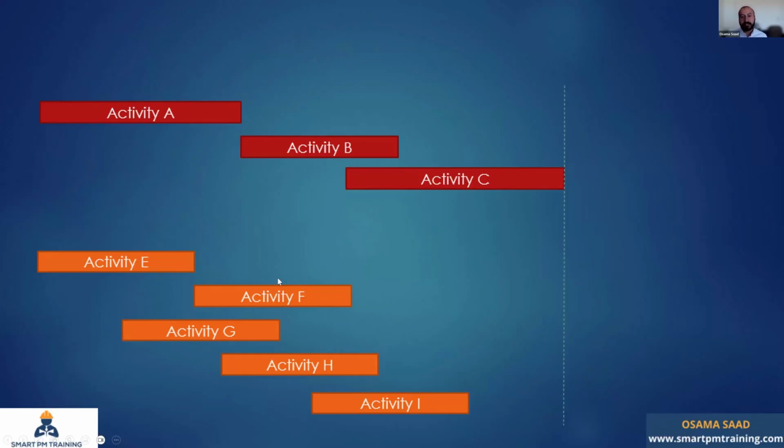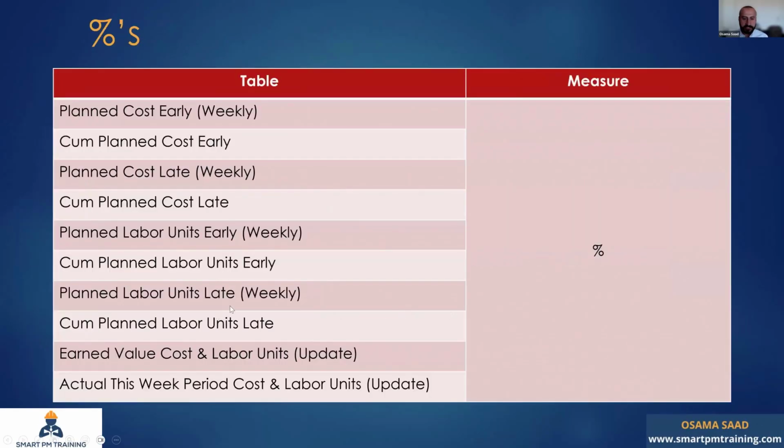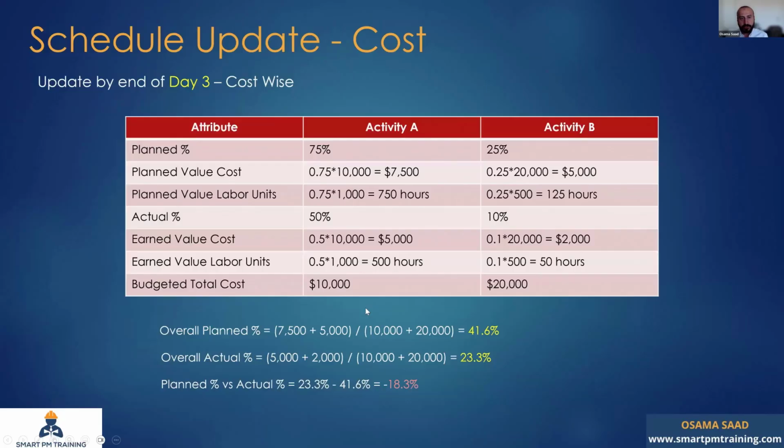And so that's why when I want to evaluate the project performance, I want to refer to the total float from Primavera, the total delay, days wise. I want to also refer to the earned value percentage wise. The one I just explained right now, the concept here is the percentage wise based on earned value. So maybe in a project, I can be 18.3% behind the schedule, earned value wise, but I'm on schedule.